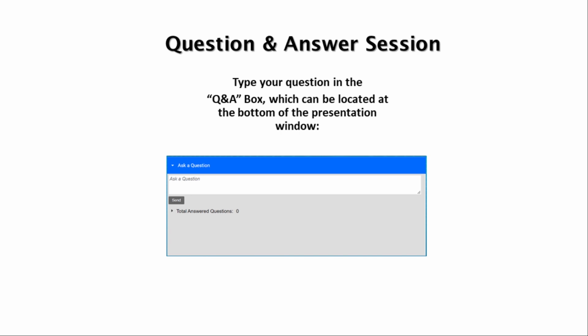Okay, so our first question is, which license or permit is the most difficult to obtain? So the most difficult to obtain, I think, is the CITES permit because the application is so comprehensive. It requires, like I said before, that we list where the species were bred in captivity, their parentage.